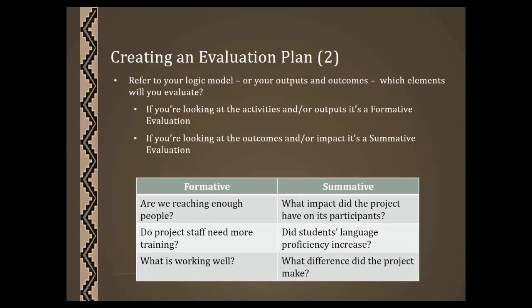A formative evaluation is looking at your activities and/or outputs. It's typically done around the middle of a project because you're looking at processes. If you're going to be looking at your outcomes and/or impact, that's known as a summative evaluation, and most times you're looking at that towards the end of the project.